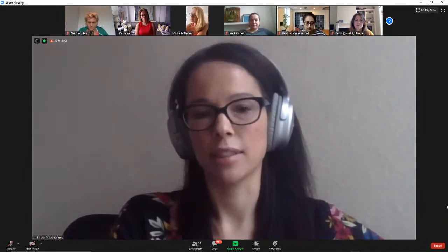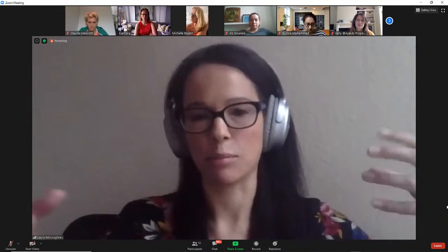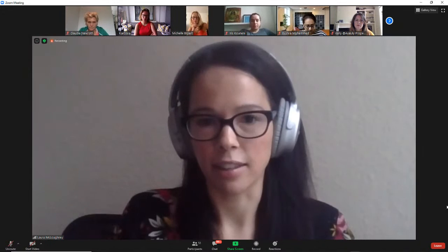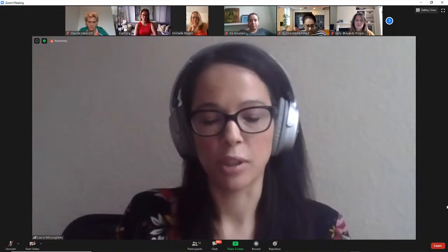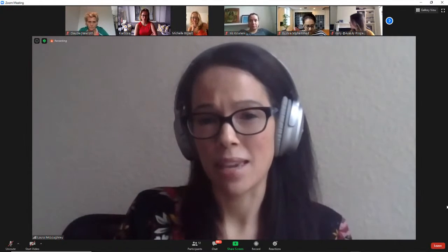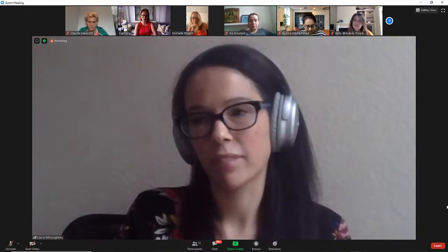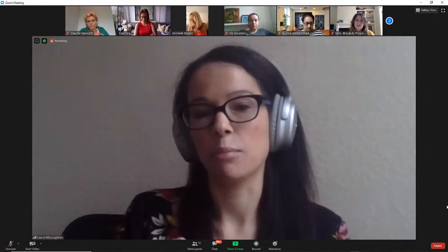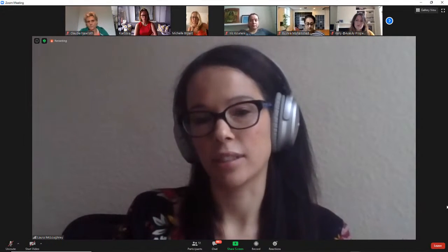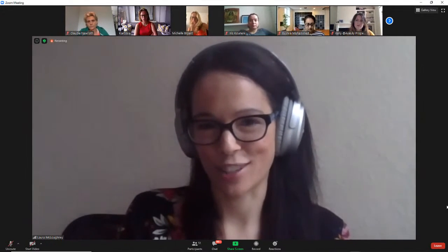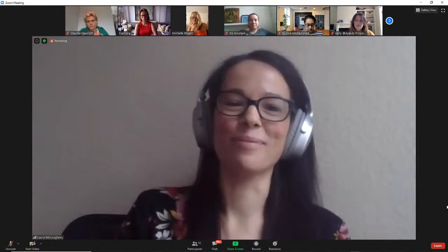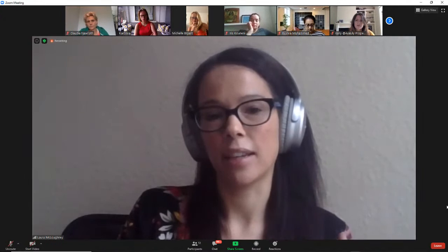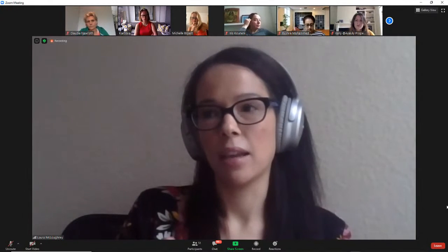And that is separate. It is a project cost for me. We need somebody in that role, and I'm a better cost than going to hire somebody else out for that. So that will have a different fee, and that will typically be a tolerance. It'll be a nominal hourly fee based on, we want this number of project management hours, and then you get into conversations about overtime, and this is where the project manager has to manage their own budget, which gets a bit unusual. So I think certainly if you're independent and you're looking at sites on your own, pound per hour can be good,